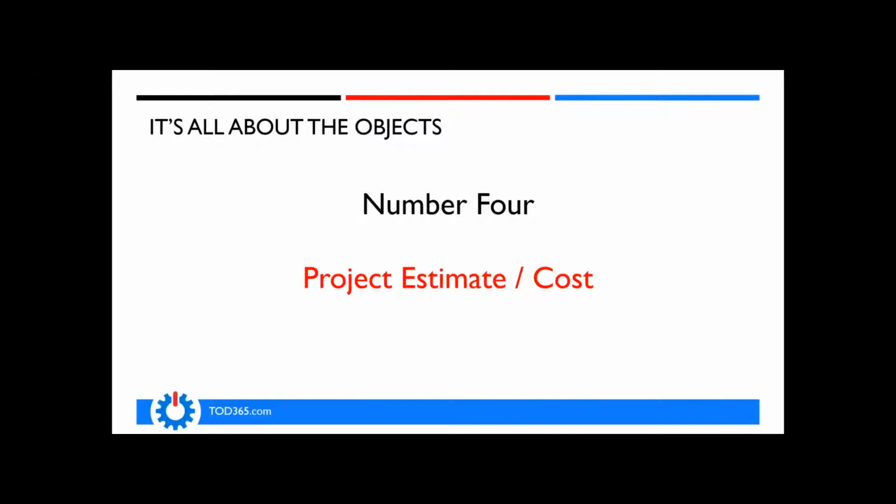What we have found is that in estimating these projects, it's really critical, and as some of my technical folks talk to me about, that it's all about the objects that have to be upgraded, right? And so objects, I'm not a technical person, so objects are explained to me as forms, reports, classes, custom objects, custom integrations, and custom functionalities.